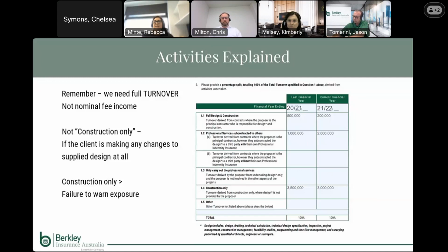So it goes without saying that the potential for loss for a $10 million project is much more than 10 projects being undertaken at $1 million each. And we also find that the longer the project, the higher the risk the client has due to an increased exposure to emerging regulations and conditions over time. So we've seen this fairly recently with the explosion in materials and supply costs, and a lot of builders had agreed to fixed contracts, and this brought about a complete collapse in terms of the construction industry.